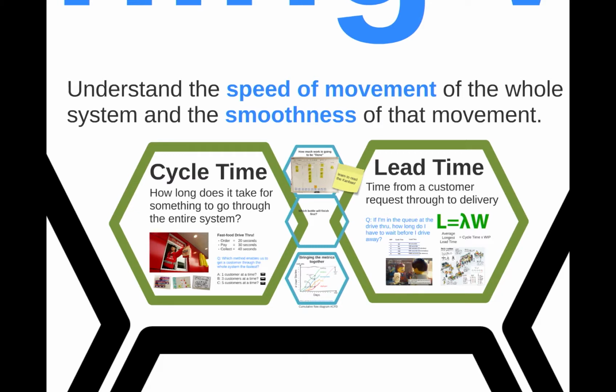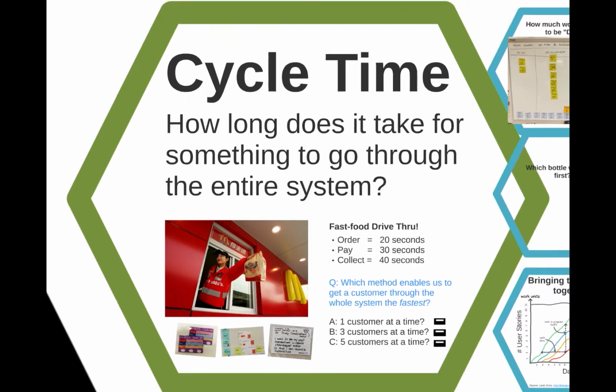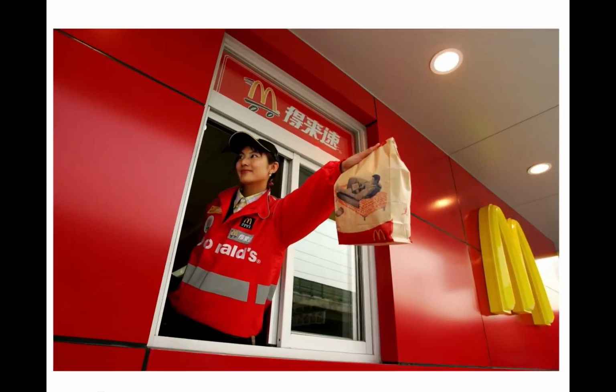Only 2 metrics. For Scrum, obviously, you've got velocity, but if we're just going to use Kanban, and that's what this team was using, only 2 things: lead time and cycle time. That's all I need to understand flow. This is cycle time. Once something starts, how long before it's finished? That's really all it is. How long does it take for something to go through that system?